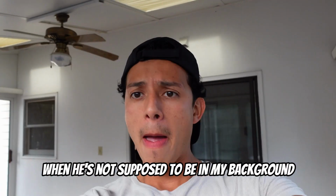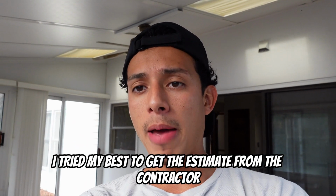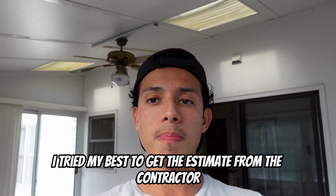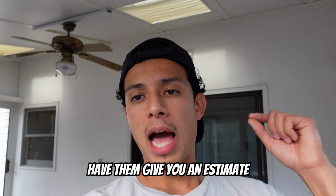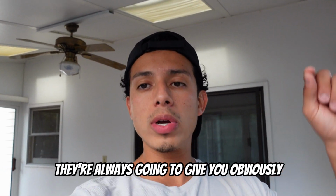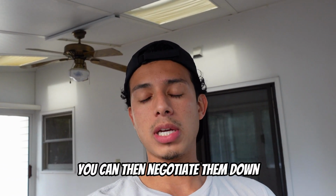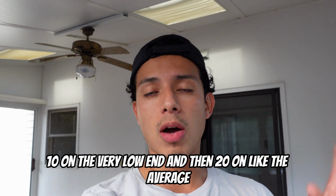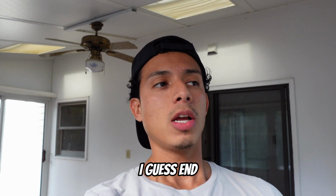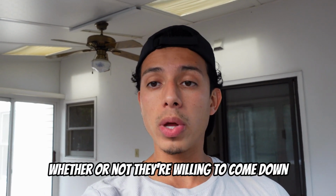But anyways, when it comes to negotiating, I tried my best to get the estimate from the contractor first, right? So you have them walk it, have them give you an estimate. They're always going to give you obviously their highest price. From that price, you can then negotiate them down. Usually contractors are trying to make 10 to 20%. 10 on the very low end and then 20 on the average end. So they have wiggle room.